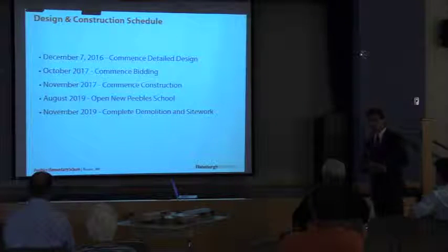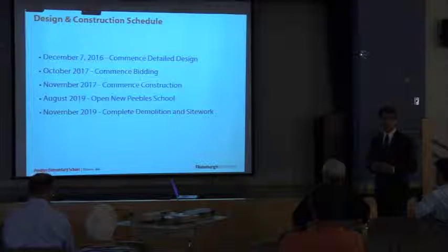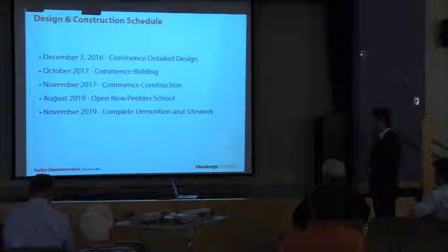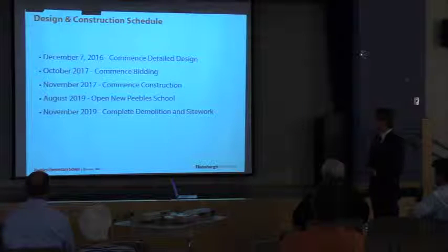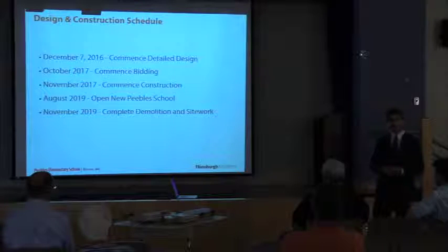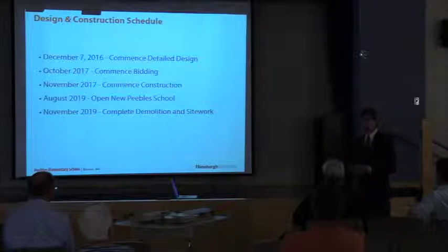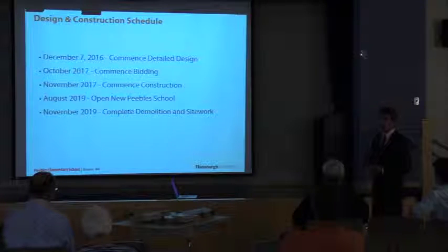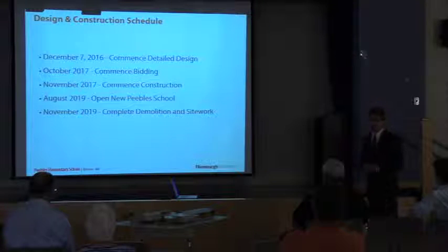There are various submissions to the state as well. They will continuously monitor this project to make sure that we're designing to the project that their board approved, such that we would commence construction in November 2017 with the goal of opening the new People's School in August 2019. So that period of time is to develop our transportation plan to make sure that it is in place for August 2019. We have years to really make sure it's the best plan for the town.